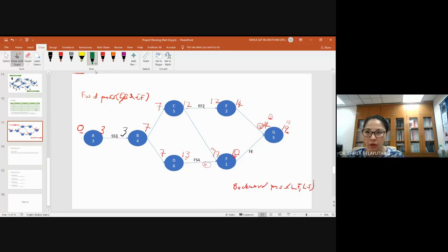Okay, so 19 minus 5 days, 14. Okay, so finish to finish relationship. So G finishes 19, your F will finish also 19. Finish to finish. Minus 1 day, F will finish 18.